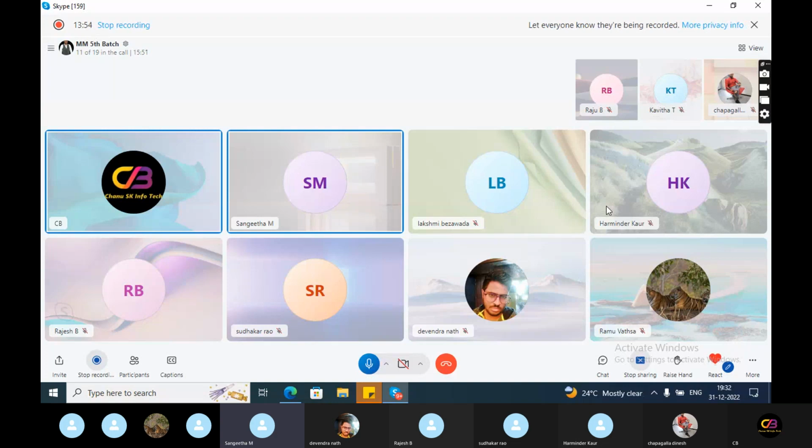Next comes the deploy phase. Here we usually do system integration testing, that is SIT, then UAT, and cutover activities like data migration, such as vendor data, transactional data, and master data. Rise up activity is also involved in the deploy phase. And at last, we have the run phase. Users will start using the system, and they will post all the transactions here based on their day-to-day activities.